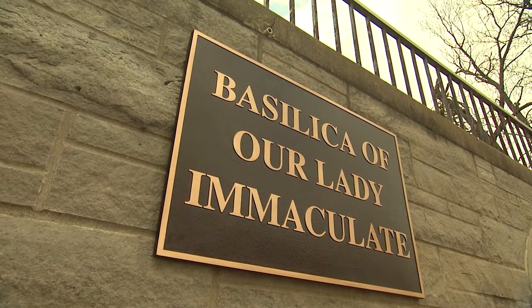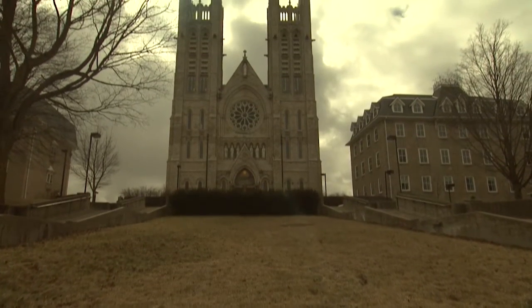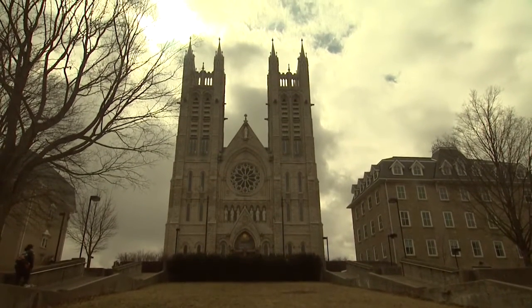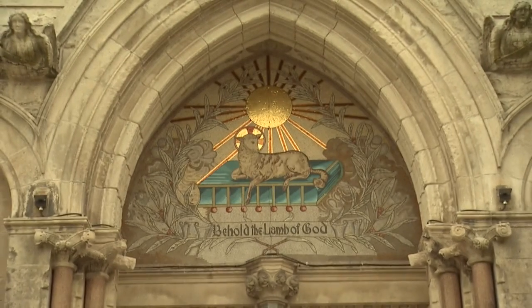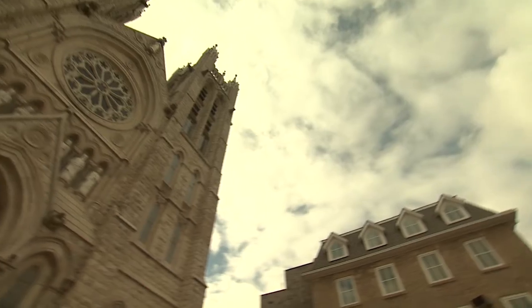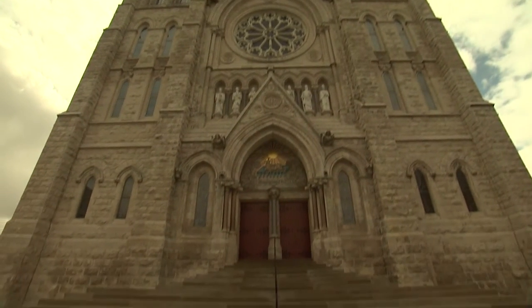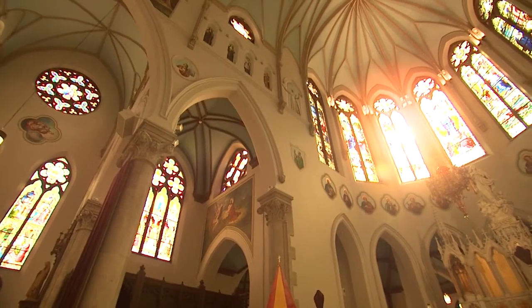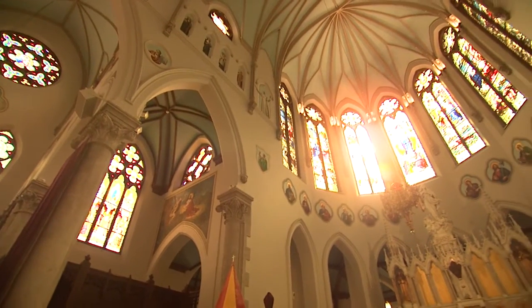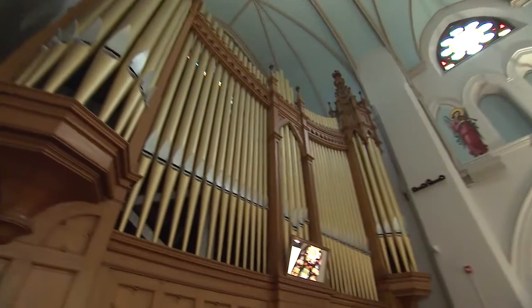The church was completed in 1888, and it had restorations over that period of time, but then we got to the point where it was in serious need of an interior restoration. We started planning in 2006. The first phase was the towers in 2007, then we went through successive phases until phase 5, which was the interior that we had done, which we planned in 2013 and took us all of 2014 to complete.